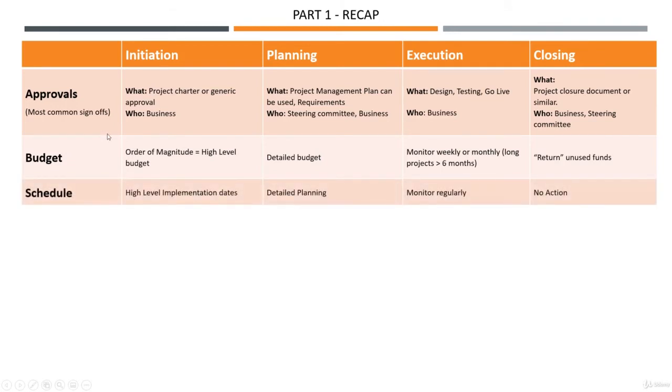The schedule, very similar to budget. High-level implementation dates during initiation. You don't have a detailed Gantt chart at this stage, but here you do get your Gantt chart more granular, and you get it signed off as well as part of the project management plan.